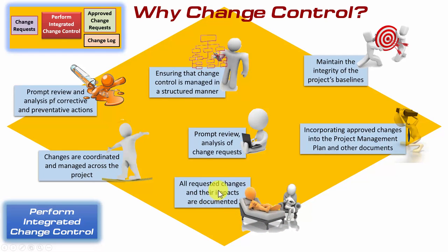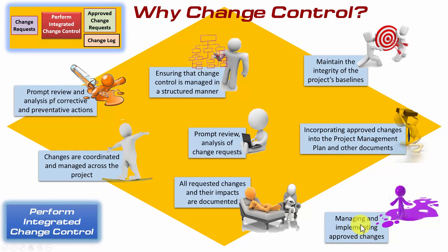Another reason is that all requested changes and their impacts are documented. People do tend to have selective memories when it comes to changes, and what might seem a good idea on Monday, by Friday, once the full impact is understood, it may be too late to revert to the original configuration. Plus, of course, people get blamed for this. So the path from the original change request right the way through to when it is eventually approved, that audit trail must be documented. And the final good reason I'll mention here is that it will give you a holistic process for both managing and implementing approved changes. And you're about to see exactly how that occurs.